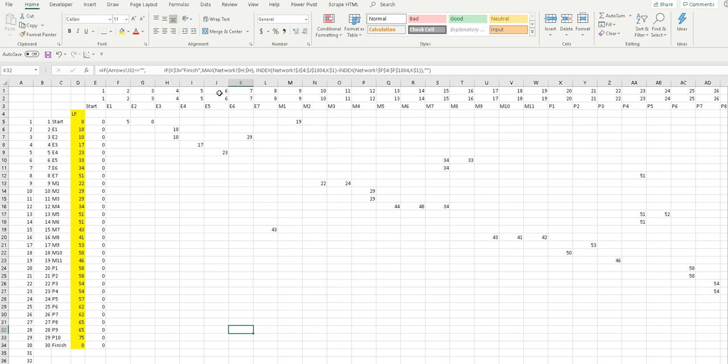And let's make sure we got anywhere there's a formula. That's simple numbering in that row. There's that formula in the second row. There's the third row, which is the activities. That's just bringing them over using the index function. Then here's your equation for the body of the table right here. And there you go. That just copies over all the way. And then here we go, that's just another formula here. See, that's the same. Right here's the same. Now, the latest finish is the min of that whole row.